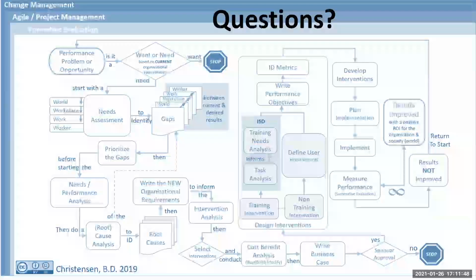One thing that strikes me is we can link the end of your model back to the beginning. One of the things that's really important about the needs assessment versus the needs analysis is that the needs assessment is a deep dive into the problem or the opportunity, with the idea of specifying what's really going on there. But the other value is that if you do a good needs assessment, you're going to come out with a statement of a performance gap that's going to already have some pretty good standards and measures associated with it.